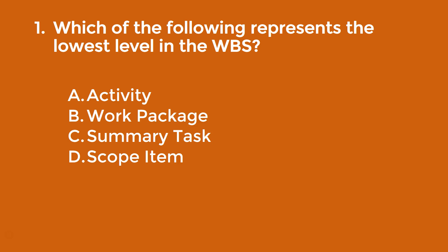Here's the first question: which of the following represents the lowest level in the WBS? The answer is the work package. Work packages are eventually decomposed into activities in the define activities process. The WBS lowest level is the work package, and the way I remember is that WBS and work package both start with Ws.